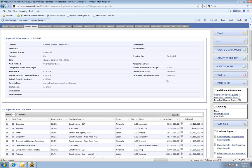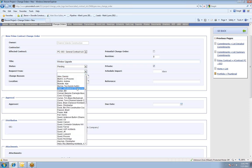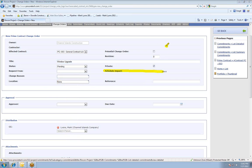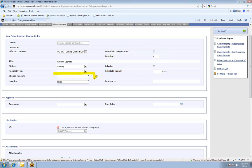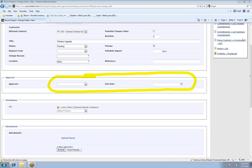I clicked the create a change order button on the right-hand side. This is the change order form that needs to be filled out. At the very top is where you give the change order a title — I'll make a demo change order here. I can document where this change order is originating from and who requested it. I can also note any scheduling impacts. There's a check box to mark this as a potential change order — a way to differentiate PCOs from actual change orders. Down here there's an area to document the change order reason, and you can tie it to a location on the job site. Those drop-down menus are completely customizable.